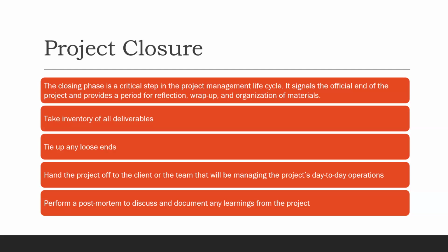Or perhaps you had a very good project auditing process that particular year. Auditing was done, you had a robust report from the auditors and you were excited about the results. However, you never implemented that which the auditors had recommended. These are loose ends in a project. And you could lose continuous funding from the same donor, or if you submit a proposal for some more or other type of funding, they might turn you down because of that.